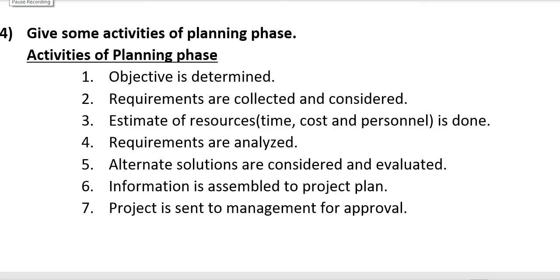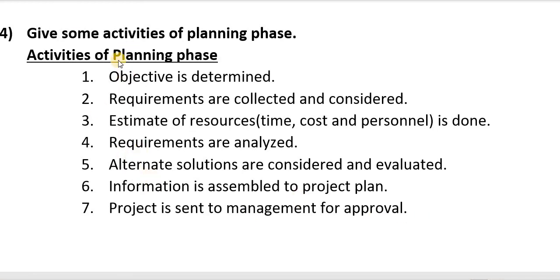Question four: Give some activities of the planning phase. The activities of the planning phase are: 1. Objective is determined. 2. Requirements are collected and considered. 3. Estimate of resources — time, cost and personnel — is done. 4. Requirements are analyzed. 5. Alternate solutions are considered and evaluated. 6. Information is assembled into a project plan. 7. Project is sent to management for approval. Write all these activities in sequence. Take a screenshot.